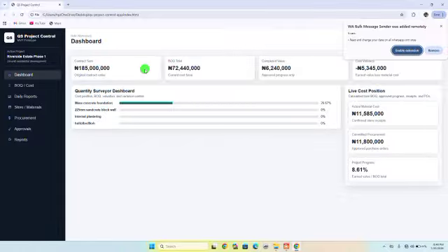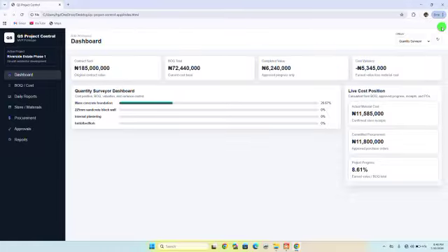From here, it is role dependent, in the sense that it depends on what role you have. For example, if you're a quantity surveyor, you can have the overview of your contract sum, your BOQ total, the completed work, that's the completed value, and your cost variance. So at each point in time, you know how much you spent, and if you're in profit or at loss.